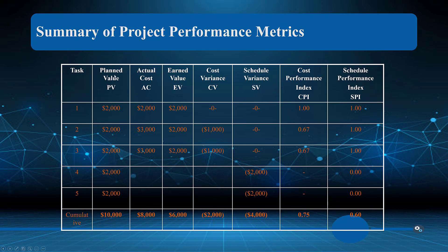Here is the summary of the metrics we've discussed. The planned value for each task is two thousand. For the first task, the actual cost is two thousand and the earned value is two thousand, so there's no cost variance and no schedule variance — the CPI and SPI are both one, meaning we were good with both cost and schedule.